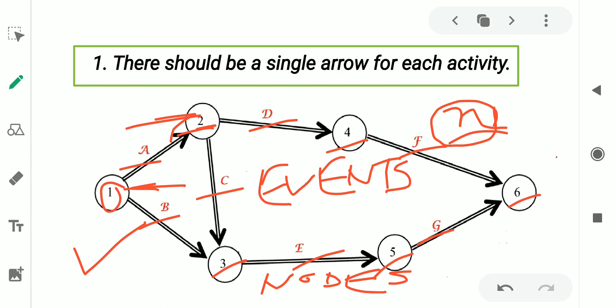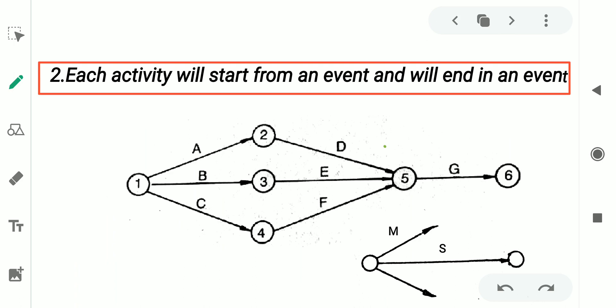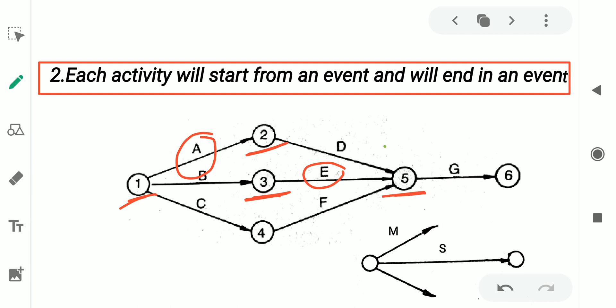The second rule is each activity will start from an event and will end in an event. Every activity must emerge from an event and merge into another event. For example, activity A has emerged from event 1 and merged into event 2. Another activity has emerged from event 3 and merged into event 5. All other activities like B, C, G, F, G have also started from an event and finished in another event. According to this rule, this particular project network is correct.